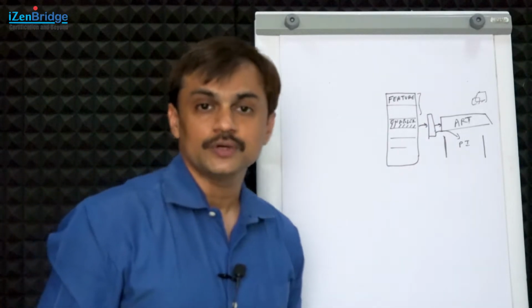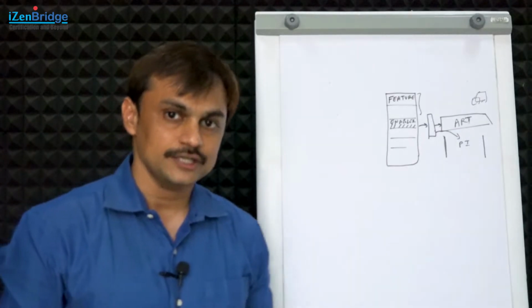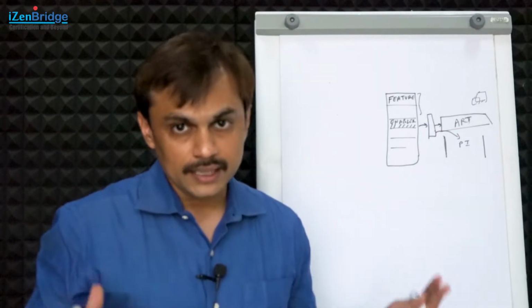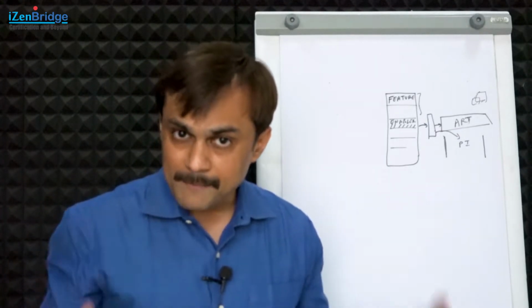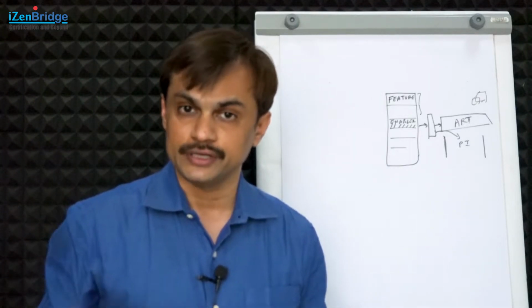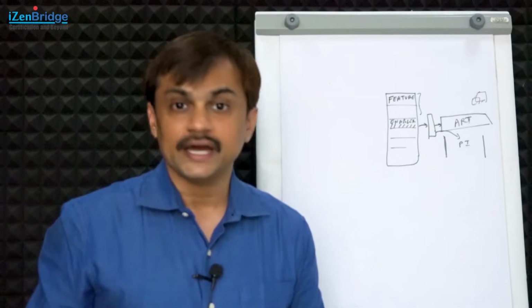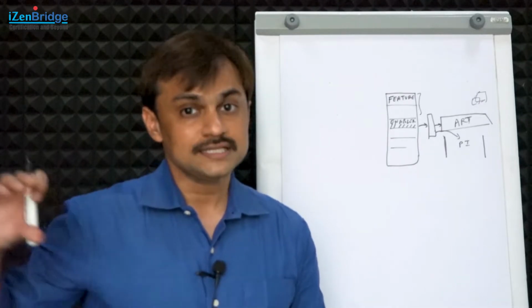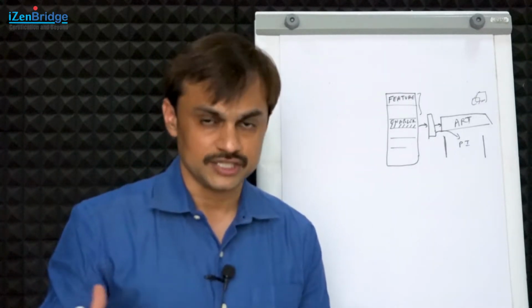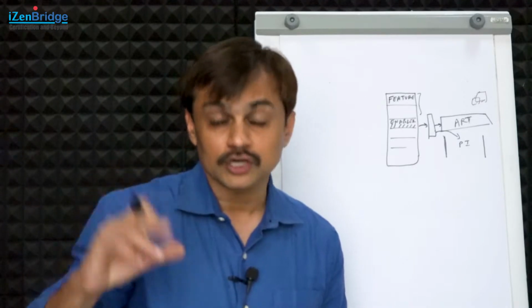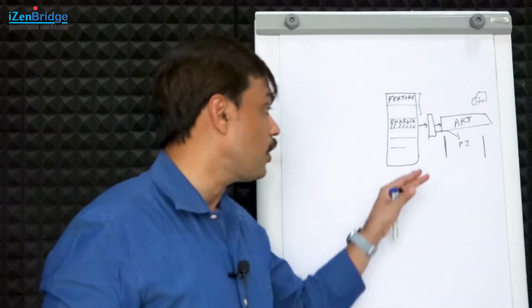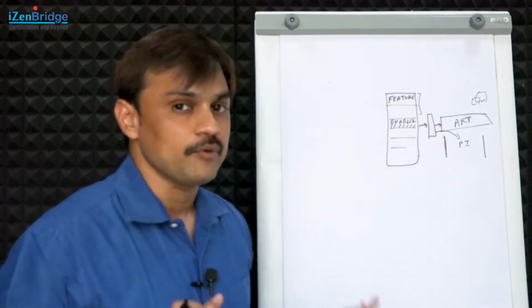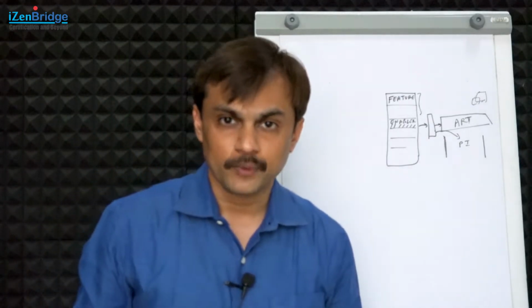We also explored that the system architect is expected to facilitate the enablement of the compatible architecture at an agile release train level, and in order to do that, the system architect may want to get some work explored by multiple agile teams. That portion of work, which is technology oriented, is called an enabler. So these are the two types of work items coming in the program backlog.